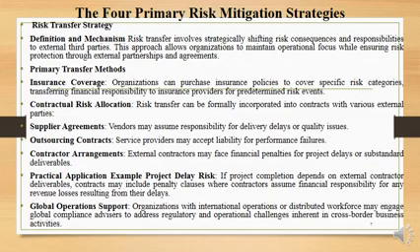Practical application example: project delay risk. If project completion depends on external contractor deliverables, the contract may include penalty clauses where contractors assume financial responsibility for any revenue losses resulting from their delays. Global operations support. An organization with international operations or a distributed workforce may engage global compliance advisors to address regulatory or operational challenges inherent in cross-border business activities.